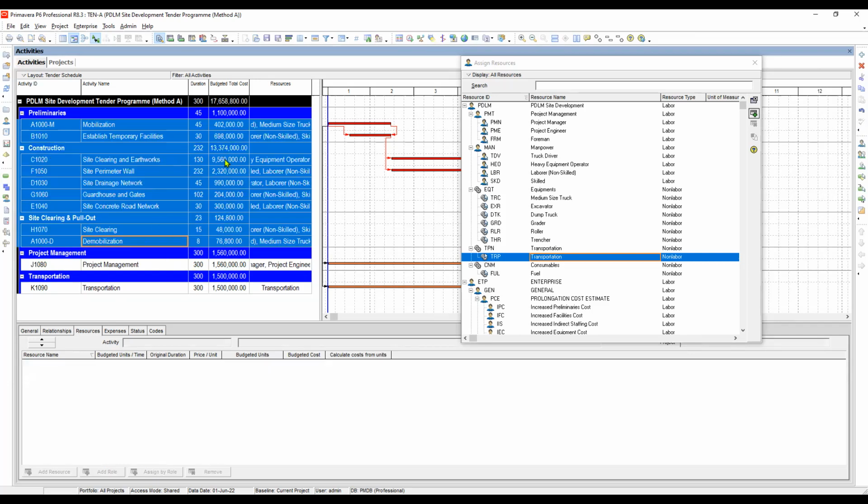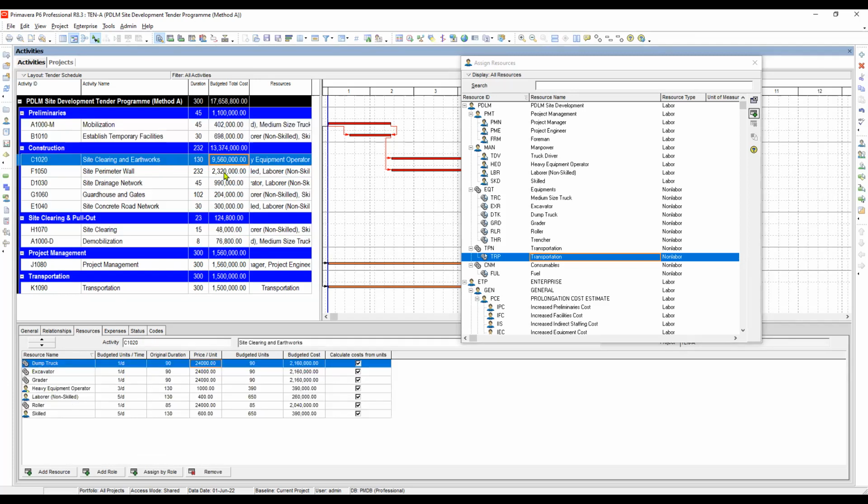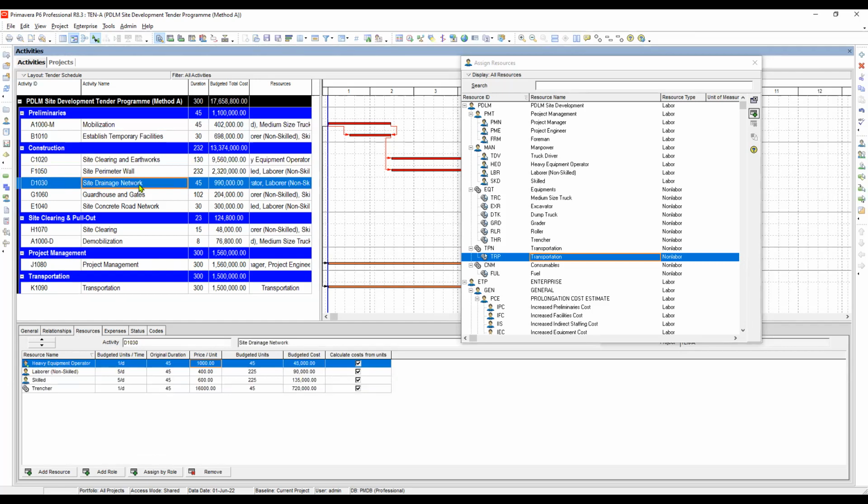But when we are preparing an estimate, let's say for bidding, of course, we have to incorporate the additional items, for example the overhead. We will explain that later. We have the overhead, the contingencies, like the wastage of materials during installation, and then the taxes, and also the profit of the company.